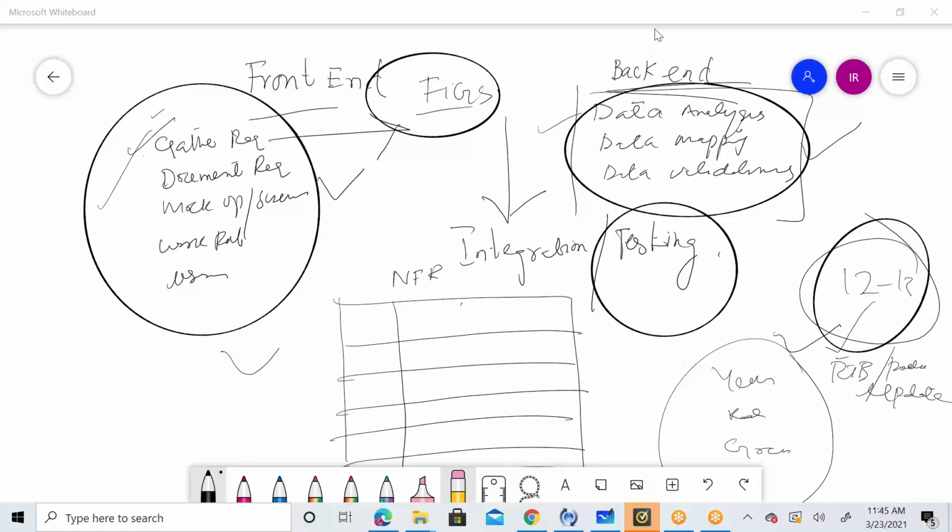You're having multiple meetings. Let's suppose I'm stuck on my 3rd or 4th functional requirement. I'm not sure. That's not a problem. Identify the key stakeholder, who's the right person to answer this, have a meeting with him, a 15, 20, 30-minute meeting. Before having this meeting, email him, this is what I'm doing, this is where I'm reaching, and these are a few of my questions, so that he or she is ready before you set up a call with them. And then they can let you know that, okay, this is how we want the flow to be, this is how we want the acceptance criteria to be, or this is how users are going to use this application. Meetings, meetings, meetings, and meetings.